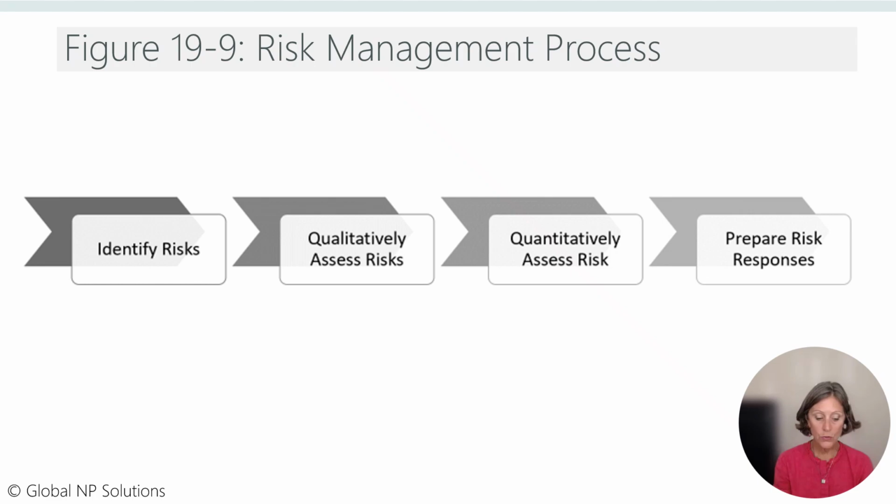We have found that using rolling wave planning reduces wastes of time and recycle in scheduling, while also allowing team members autonomy to complete tasks by applying their functional expertise. Significant schedule risks should be discussed and added to the simplified QFD and risk matrix as needed.